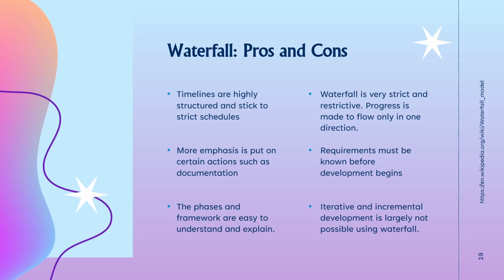However, in the real world, this doesn't always tend to be the case, right? Waterfall is very strict and restrictive, and what happens if, say, during testing, you find out that there's a major bug, or maybe during testing, you find out that there's a brand new requirement, and that brand new requirement requires a lot of new development. Well, then you would need to do all the planning and development, and you would need to plan out some schedule for it. It becomes very difficult, and it's not a framework that really allows for that kind of flexibility.